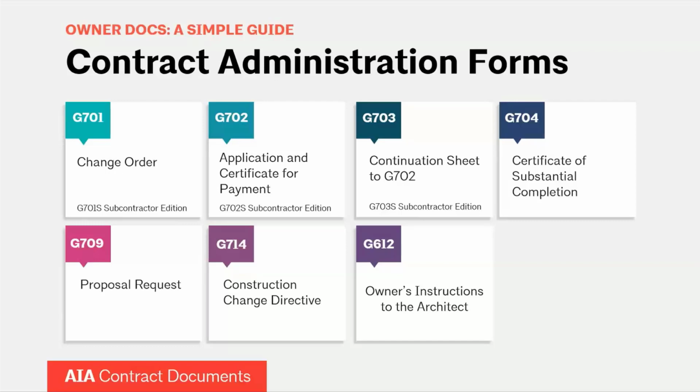A contractor would list each line item of work on that form, and then give the big picture, so to speak, on G702, which is the application and certificate, the actual application. So the architect would typically certify that, and so the contractor is applying, architect certifying, the owner is paying. That's how it goes with those forms.